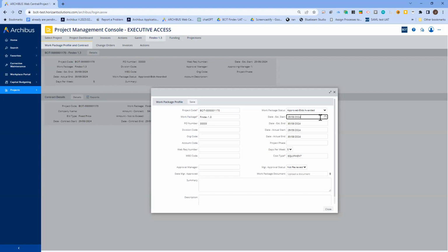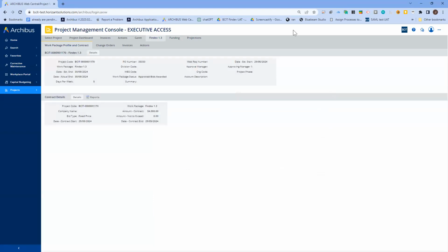Well, what I don't think happens is that if you extend the contract from 4 months to 6 months, I don't think it readjusts that last forecasted value for you automatically. Sorry, Mel. Yeah, so that would be an example. And when you go in, it's going to show if that pushes anything out or over, that would be an adjustment that you'd have to make in the projections worksheet. Good point, Mel. And good question, Glenda. And good catching me being untruthful in my answers there.